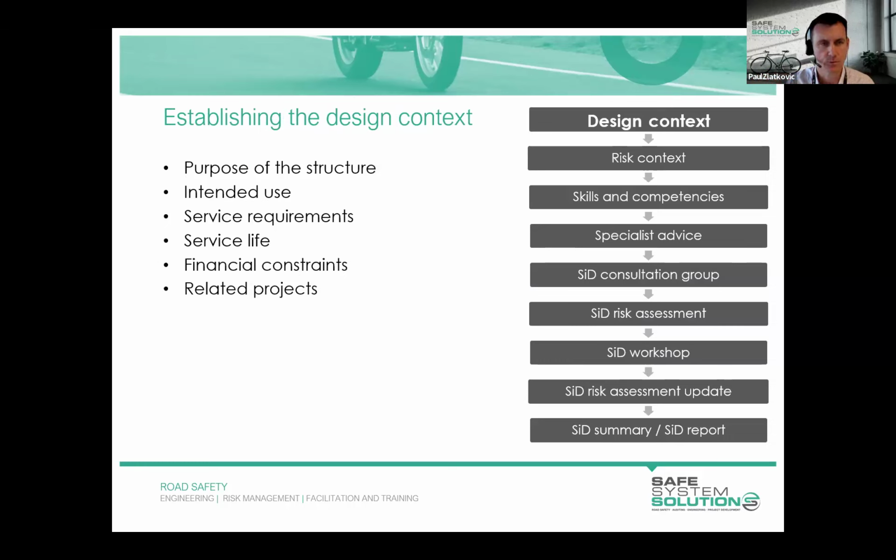So the first task we've got is to establish the design context. In that, we've got to understand what the purpose of the structure is, its intended use, service requirements, service life, any financial constraints that are relevant, and any related projects.